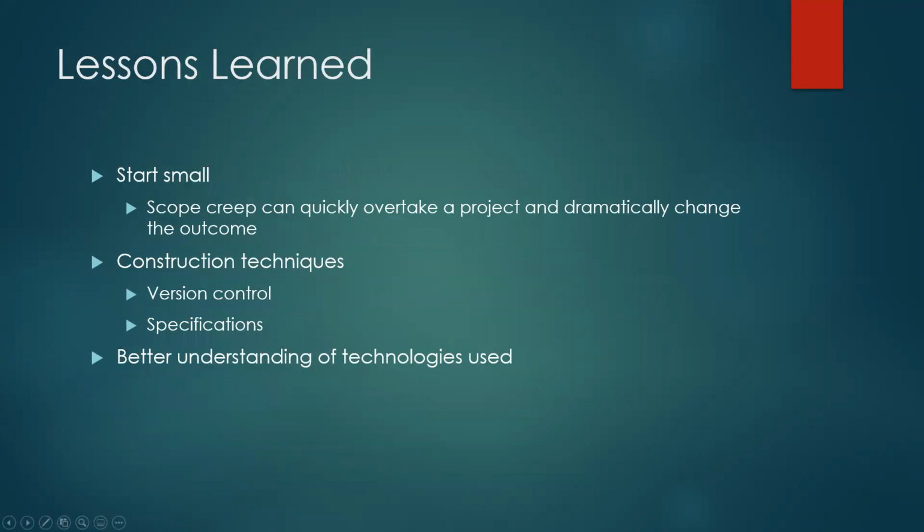Lessons learned. From this project, many things were learned. Perhaps the biggest key is to start small and expand the project as components become completed. This is evident in some of the CRUD operations that have been developed in only portions of the application.